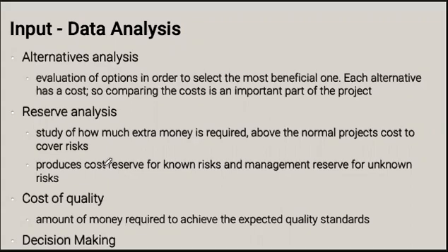Now, the known unknowns would be slightly different from the unknown unknowns, because the contingency reserves associated with activities wouldn't be the same as the management reserve, which is essentially at the discretion of a manager, whether any of the unknown unknowns shows up and requires a contribution from the management.